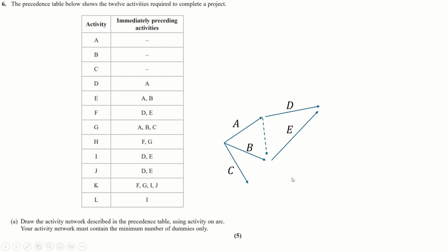But again, that's really hard to see in advance. So just get a pencil and paper and just try lots of different things. That's the key idea here: if something's not working, turn a dummy around. If you think you can minimize the number of dummies more efficiently, turn one around, put things in slightly different places, and it might end up being better.